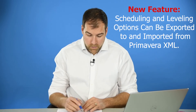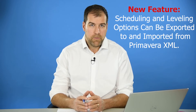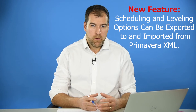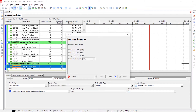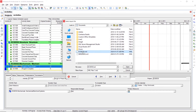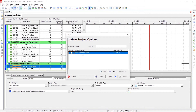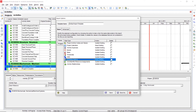Between version 18.8 and 19.12, there have been a lot of enhancements to XML — what's going in and coming out of an XML file. The first is that scheduling options you set in P6 on the scheduler page can now be saved in the XML file when you export and import a project. When you go to File > Import, choose Primavera P6 XML, and edit the default import template, you will now see Scheduling Options at the project level. You can choose to import them, update, or keep them as is.